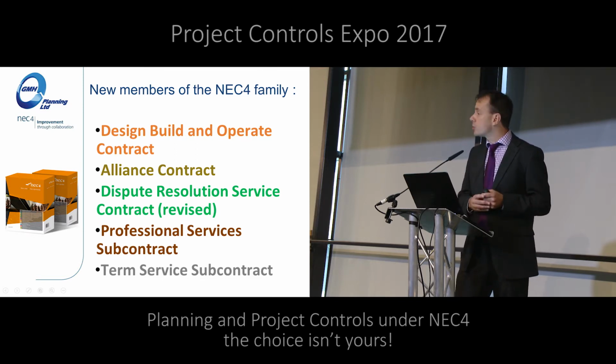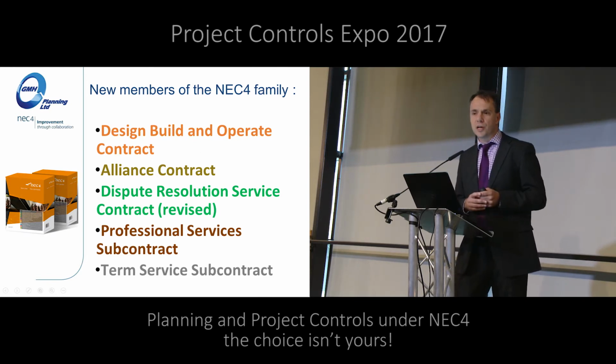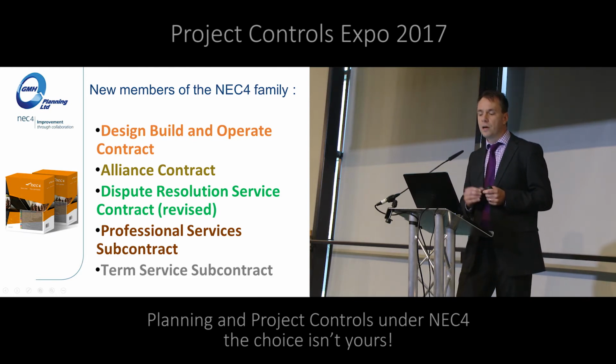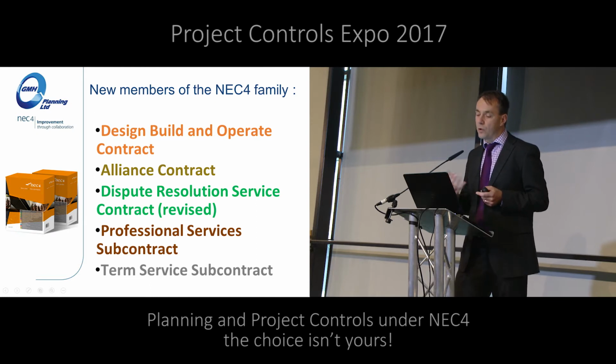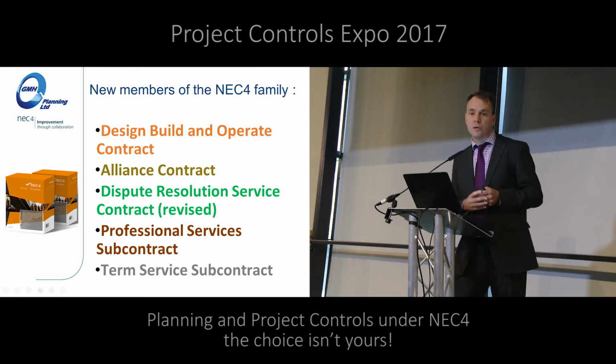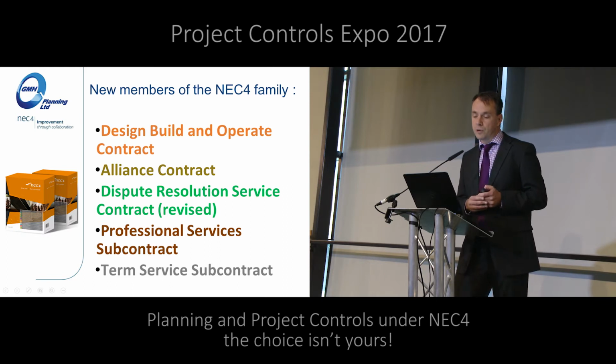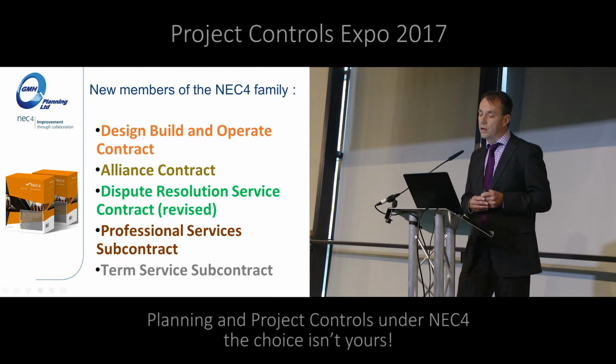The adjudication contract has been renamed the dispute resolution service contract. So a couple of interesting changes there that Ben might have talked about. First of all, disputes should go to senior management first. So that's an obligation that happens. And there's quite a new process called a dispute avoidance board, W3. That is where a board of people are going to try to help you with your disputes during the life of the project. So that's quite an interesting concept. It'll be interesting to see how that evolves.